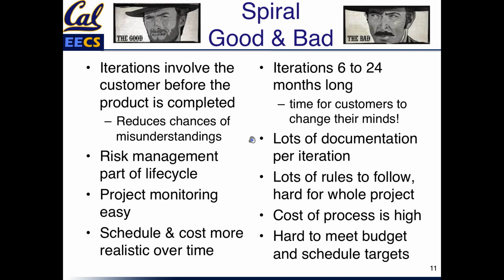Remember the rules that you follow: there are each of those 4 phases where you're not supposed to do one of the other phases until you get through the next phase, but the temptation is to skip steps, so it's hard for the project to stick to it. Because of all the documentation and the building of prototypes, it's pretty expensive, and it proved to be hard to meet the budget and schedule targets.